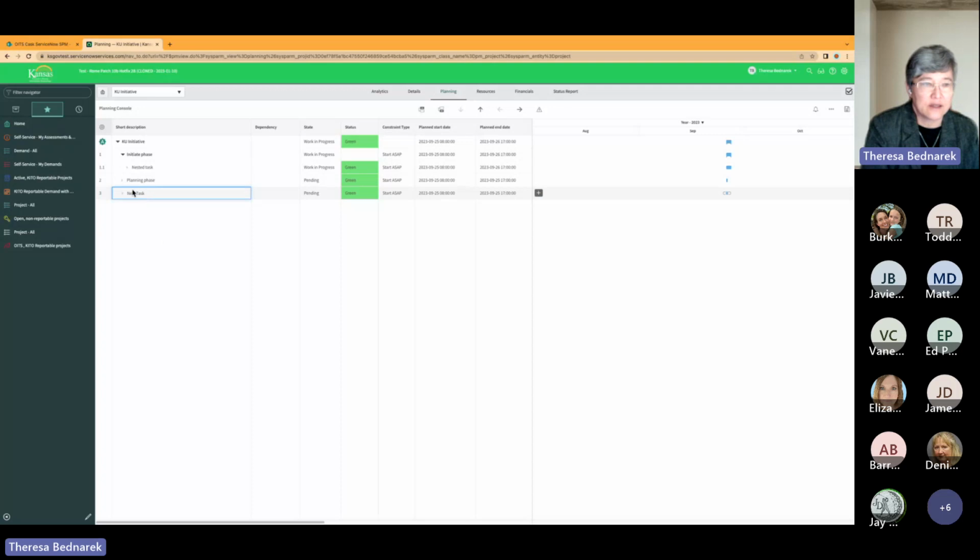So when I select this field, you'll notice you have some extra action buttons at the top. So now I want to indent this particular task. So now this is a nested task under the planning phase. If you want to unindent and make it a standalone task, you just click on the arrow. If I want to move this task up, I can put it right here.